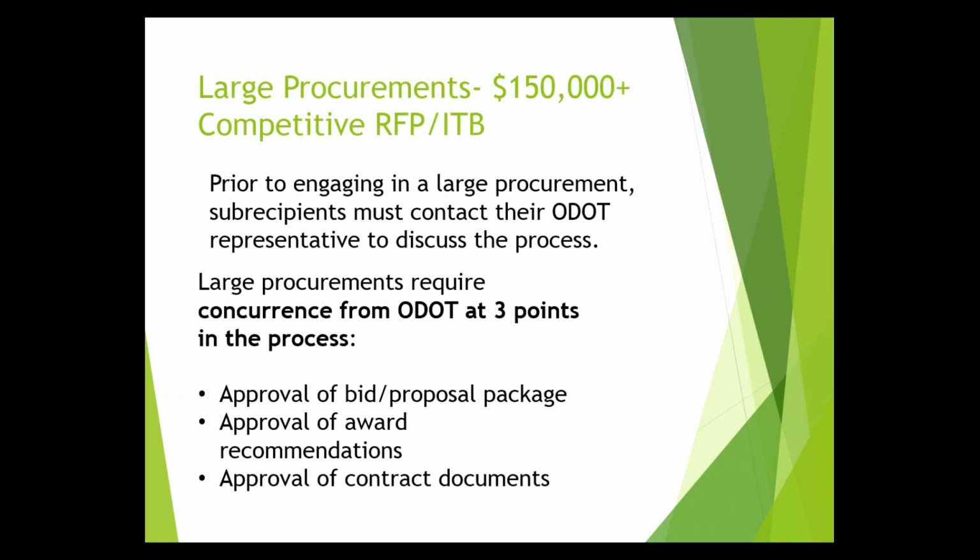So, large procurements are those procurements greater than the simplified acquisition threshold of $150,000. These are competitive RFP or ITB, request for proposal or invitation to bid. Prior to engaging in a large procurement, subrecipients must contact ODOT representatives to discuss the process. When you get to this level of procurement, we're going to be really walking hand in hand with you through every step of your procurement.